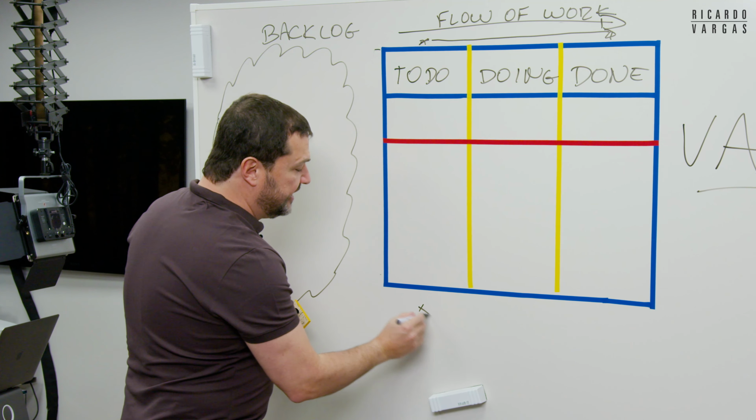The third column are the processes or the purchases. You are selecting the supplier. The fourth one, those procurement processes that are waiting for approval. The fifth one, the POs and the contracts. And the last one, done.